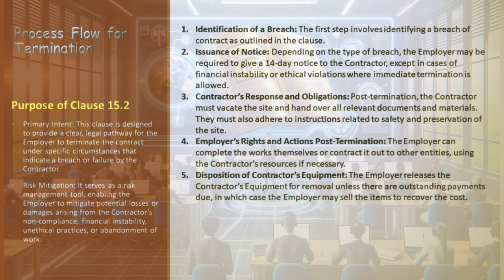The employer is responsible for releasing the contractor's equipment for removal from the site. However, if there are outstanding payments owed by the contractor to the employer, the employer has the right to retain and possibly sell these items to recover the owed amount. This process flow is critical for ensuring that both the employer and the contractor understand their rights and responsibilities in the event of a contract termination under Clause 15.2, ensuring clarity and fairness for all parties.